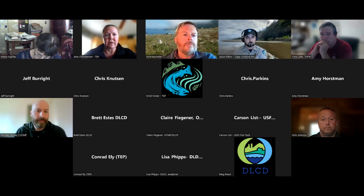Hunter and Noel are working together to share any existing data that the state has already collected, so there won't be redundancy in data collection, as far as the topographical data and geomorphic data that's been collected in previous studies. So we want to try to prevent any redundancy there, but provide ESA with a framework of what still needs to be collected. I believe they're still going to do the bathymetry data that they couldn't collect with the aerial imaging, and that should give us a full bathymetric layout of the site as it exists.